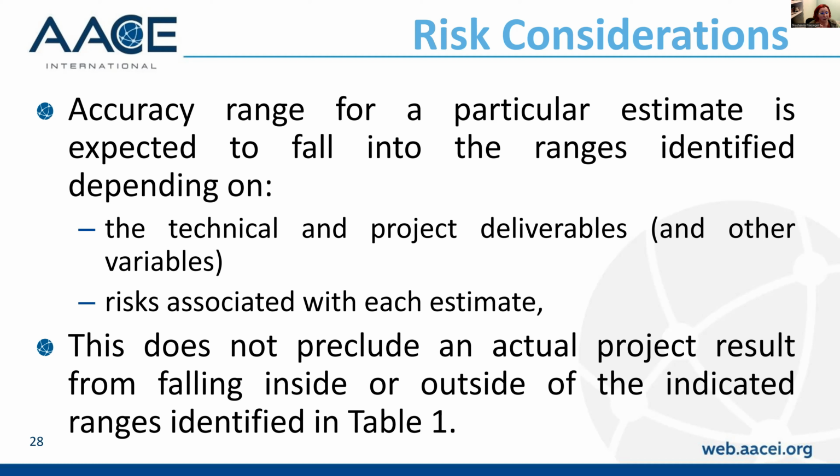And then, of course, the level of skill and the effectiveness or cohesiveness of the project team. If the team is not operating as an effective team, communicating with the estimator, then not everything about what's happening on the project is going to go into your estimate, and that means it's not going to be accurate.